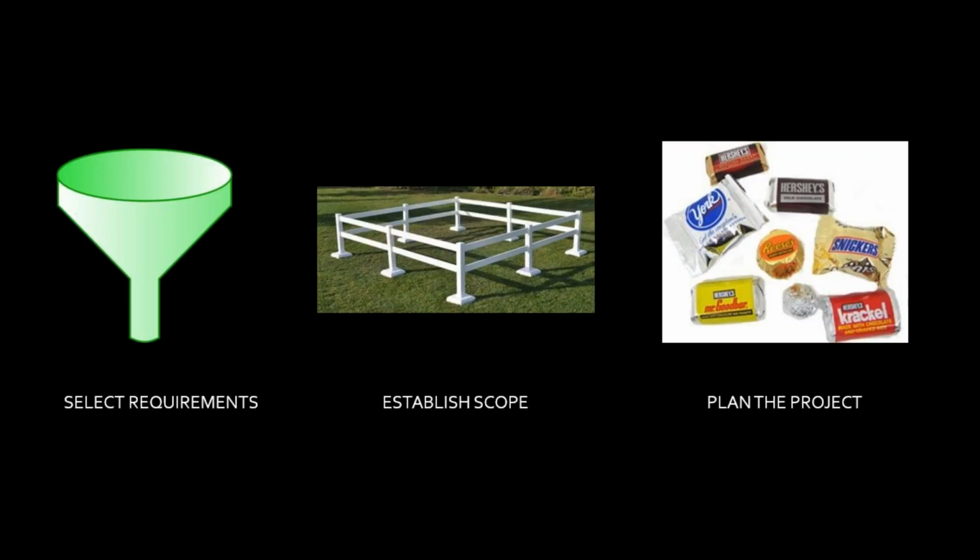Particularly in construction, when you look at all the different mini projects within a construction project, it's a really good place to look at the bite-sized principle in action. I can identify an individual task, then therefore I can identify all the resources I'm going to need: human, material, tools, time, and then I'm going to add up all my tasks.